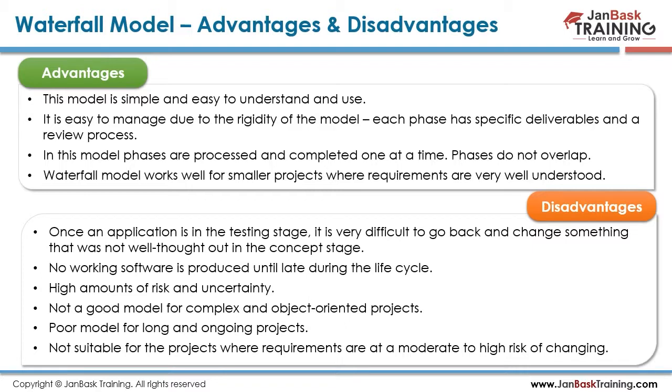Now, why does that happen? In each step, you have a dependency on the previous one. Design can't be done unless requirements are there. Implementation can't be done because we don't have finalized designs. Test can't be done because implementation has not yet been finalized. And we have very specific persons on each step. So the designer can't do what the requirements person does, and the implementation person can't do what the tester is doing. So this is how the problem statement comes into the picture.